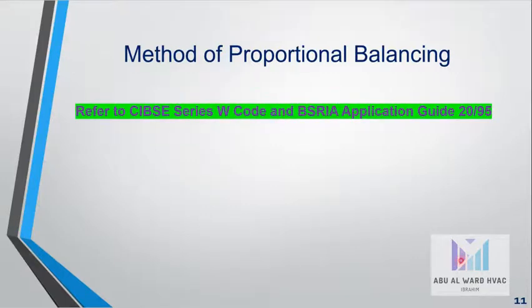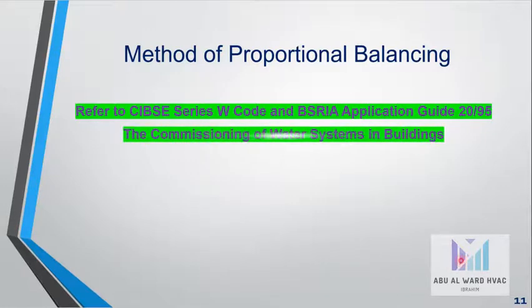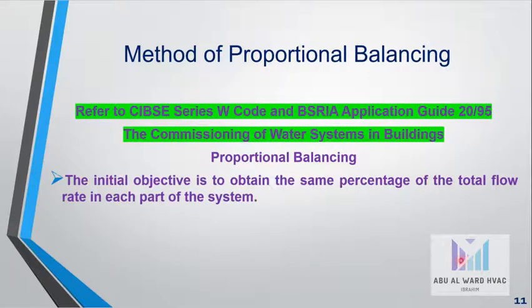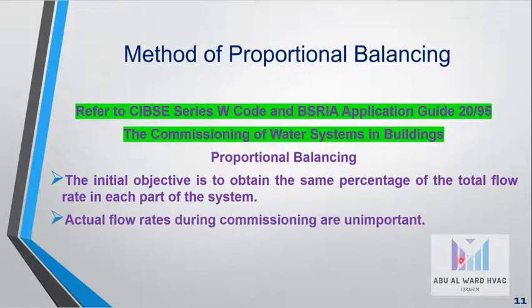What are the methods of proportional balancing? CIBSE Series W code and BUS-RE Applications Guide 20/95, the commissioning of water systems in buildings. The initial objective is to obtain the same percentage of the total flow rate in each part of the system. Actual flow rates during commissioning are unimportant.